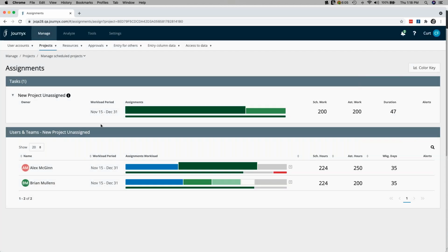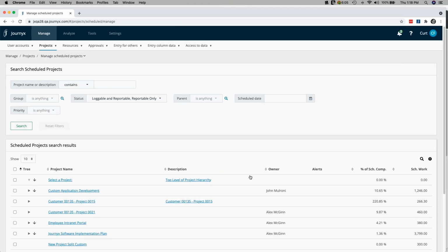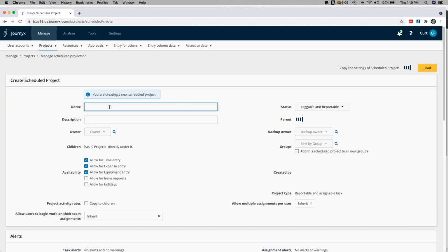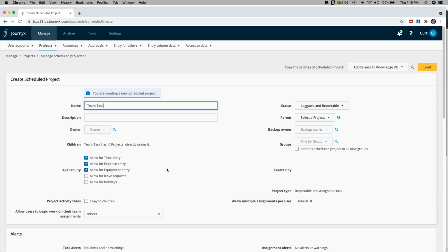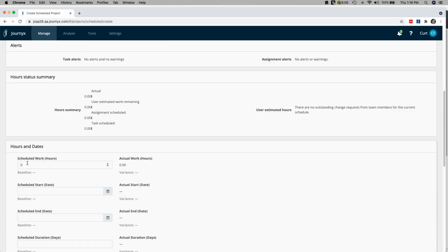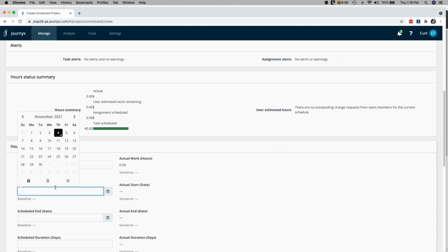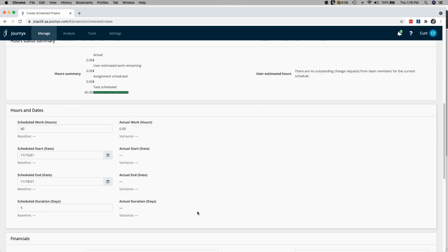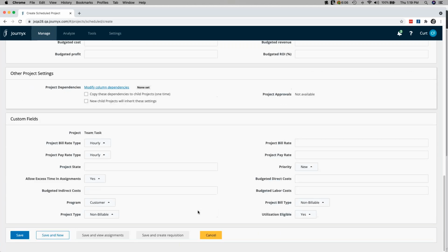The other improvement for PX that I want to note, I may just have to create a project quickly to do this, is that you can now pass on a team assignment to a resource manager to make the assignments. So I'm a project manager, and while I can assign a team to a particular project, let's say I'm not allowed to assign the individual resources who are going to work it. There's a supervisor who supervises that department or those people with those skills, etc.